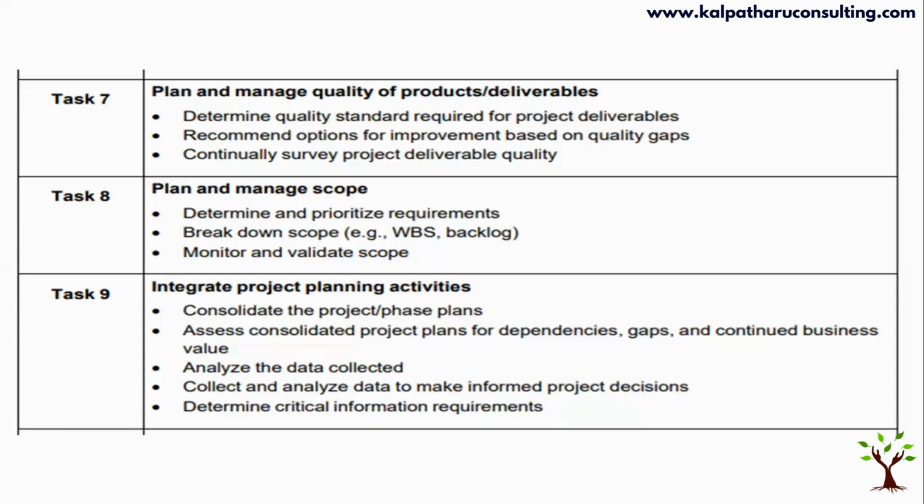You are going to monitor and control as you execute your project. You have your data: how much work is completed, how much money is spent, how many defects are there. You are going to collect that data, compare it with your plan, and see what the dependencies are and what the gaps in the project are. Accordingly, you analyze it, and based on the critical information available, you come out with a better way to fix the gap. How you are going to monitor and control, at what frequency, and what methodology you are going to use are all planned well in advance in the planning of the project.